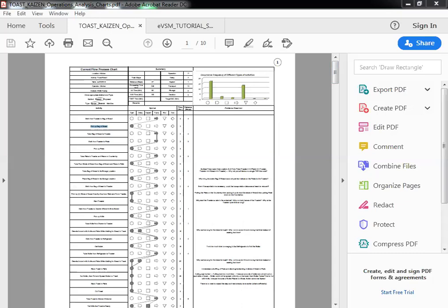So whatever schedule you produce, if in that schedule there's a step which says grab bag of bread, unless the bread is at the location that the person is going to, that activity will not consummate successfully and there will be a delay.